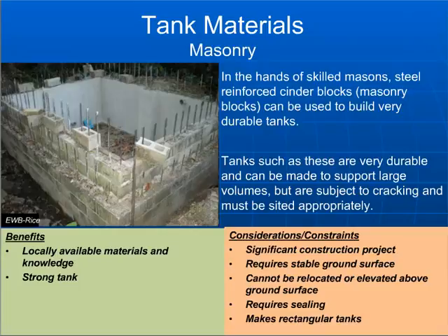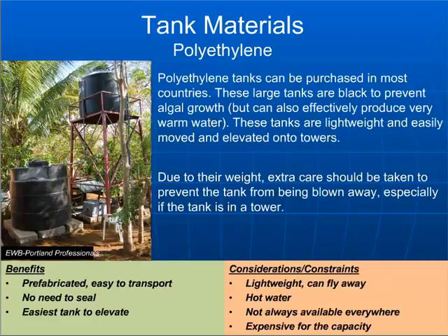The other consideration too is if you are using skilled labor, local contractors, that you have a very clear picture established with them about what the expected outcomes are, what the design specifications are, and you need to make sure that the tank is being constructed according to the way that it was designed by your chapter.